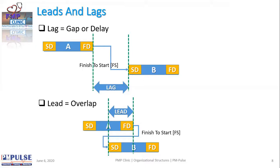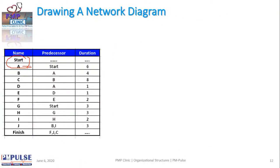Apparently people do get confused between Lag and Float, so I just want to clarify right now. A's predecessor — predecessor means what is before this activity — is Start, which means A is the very first thing that you do. So you'll have a Start node and immediately after that you have the A node.